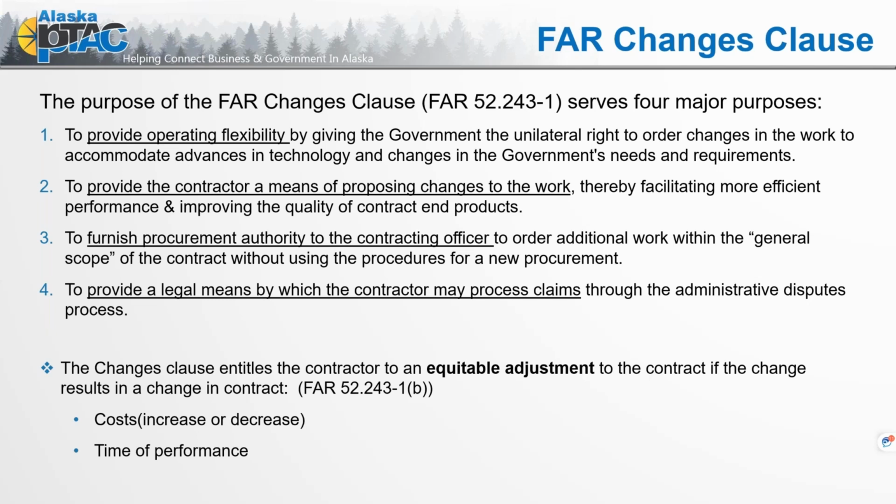and changes. So far we've been talking about government affected change, but what if you simply have a process, or through the performance, you suddenly develop a new concept, a new process, a new performance path, or you want to change out one product? There's something that we want to propose that's different. So this changes clause provides the contractor a means of proposing changes within the work, not necessarily reactionary, but getting ahead of it and saying, hey, we think we might have a better idea.